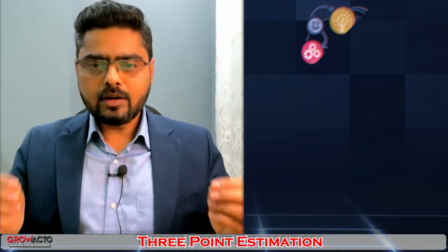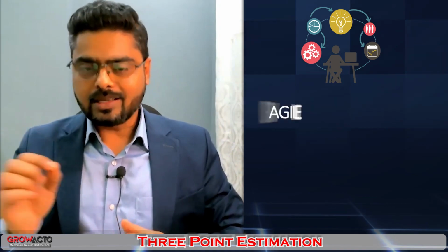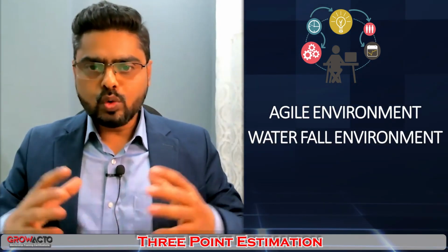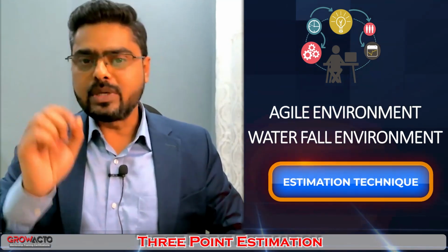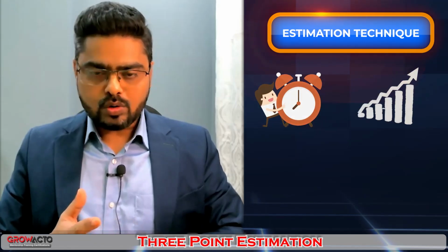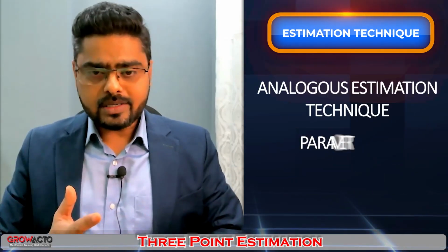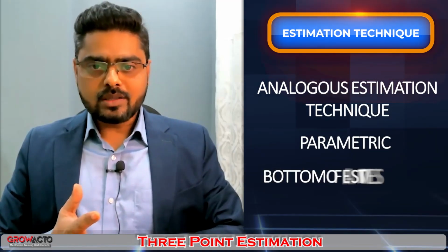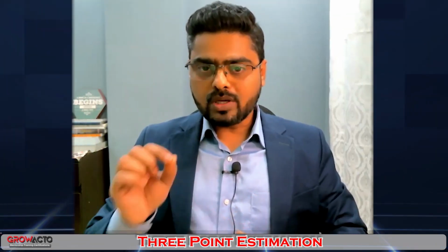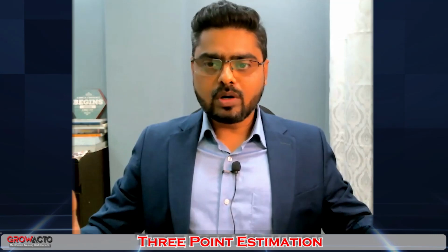No matter what kind of project you do, whether those projects are happening in an agile environment or in a waterfall environment, we do use various kinds of estimation techniques to estimate time or cost. We do use analogous estimation techniques, parametrics, bottom-up estimates, and 3-point estimates. If you are specifically working in an agile project, there are t-shirt sizing and planning poker, and so on.